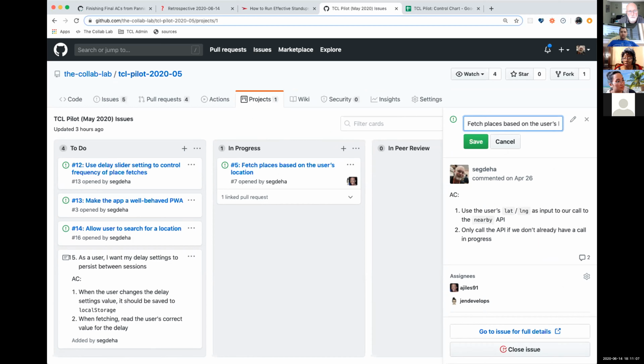I think we don't number anything at work. They're all just the names of something, and we talk about whether there are any dependencies, like does this one have to come before that one? Otherwise, they're just in priority order. In Kanban, it doesn't really matter, does it? We just have to be sure to tell what issues block this one. Yeah, exactly. That's actually something for future cohorts too. I just need to be very clear about this has to come before this other one.